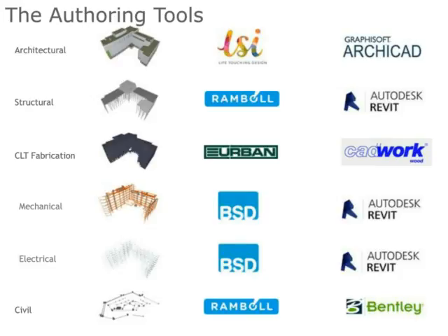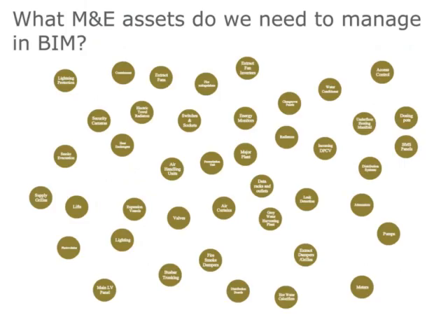So ordinarily in today's market, pulling all of those tools together would be something of a concern for those people who don't have access to some of the key tools. Fundamentally, in that process though, we sat down and determined, and you I'm sure won't be able to read that, but the point is all of those M&E assets needed to be managed in BIM, and the reason they needed to be managed was because of the eventual handover with the client.